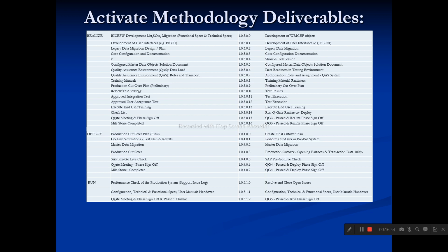Before you go live, there are pre go-live activities. As I told you, there are development, quality and production systems. All the transport requests, whatever you have configured, move from development to quality, and again from development to production. Now you have to check whether all the configuration has been moved to the production system, including RICEW objects like reports, enhancements, workflow-related items and all the technical objects.